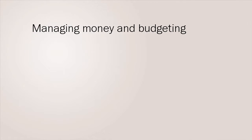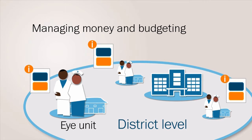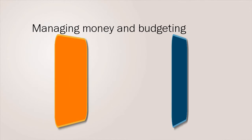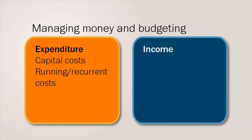Managing money and budgeting: eye care programs are integrated into district health services. Planners and managers need to present a budget for their programs to those who allocate funds, whether government or external donors. Budgets list expenditure — outgoings or costs — and income. Under expenditure, budgets include capital and running costs. Capital costs are one-time costs; they include items such as buildings, vehicles and equipment. Running or recurrent costs include items such as salaries, consumables and overheads. It is important that all costs and expenditures are included in a budget; if the exact amount is unknown, an estimate should be used. A five to ten percent contingency budget can also be added.